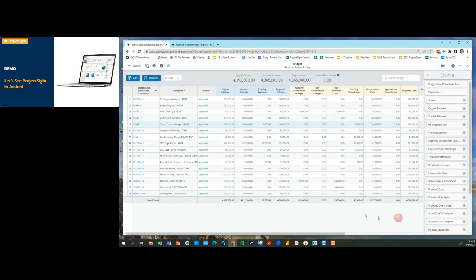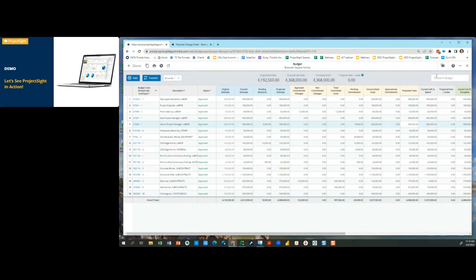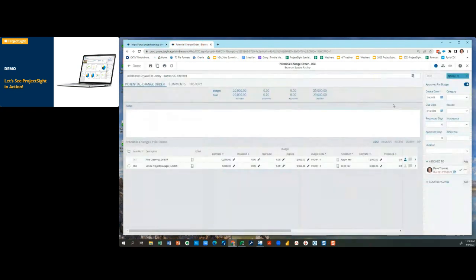I like that. If your general conditions don't have 6 things associated with it, once you click into that, you've got to figure that out, because I think that is number one, at least where I come from: you're burning through general conditions at a rate that is just not viable. So you've got to know you're putting general condition change orders in there early and often, as we say.